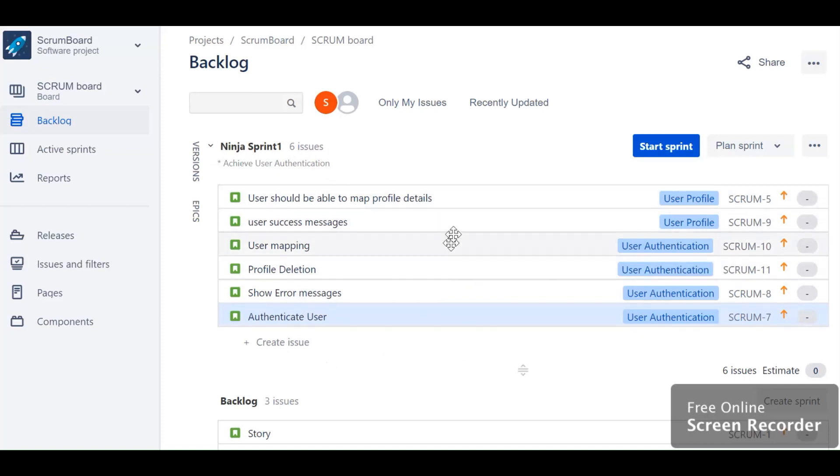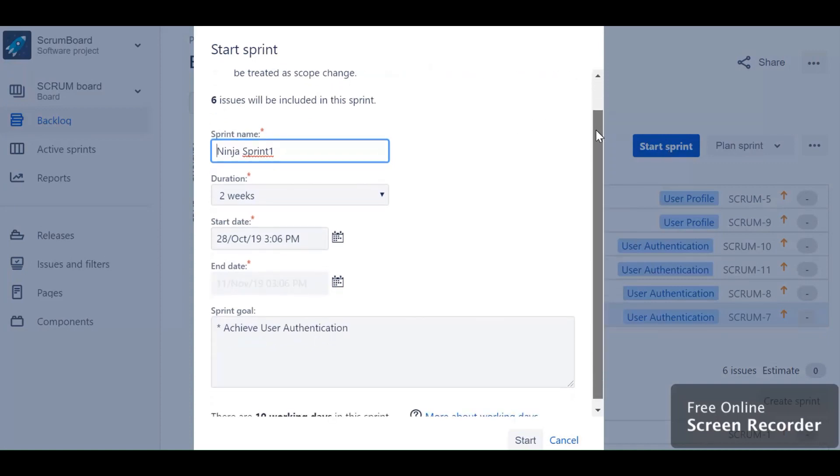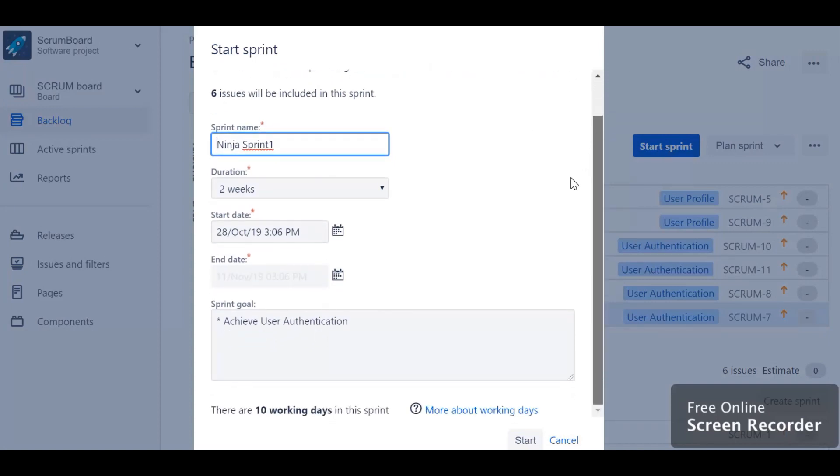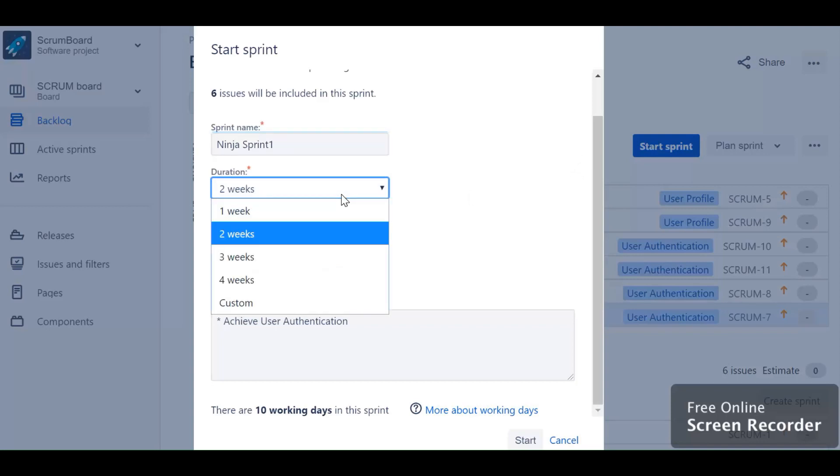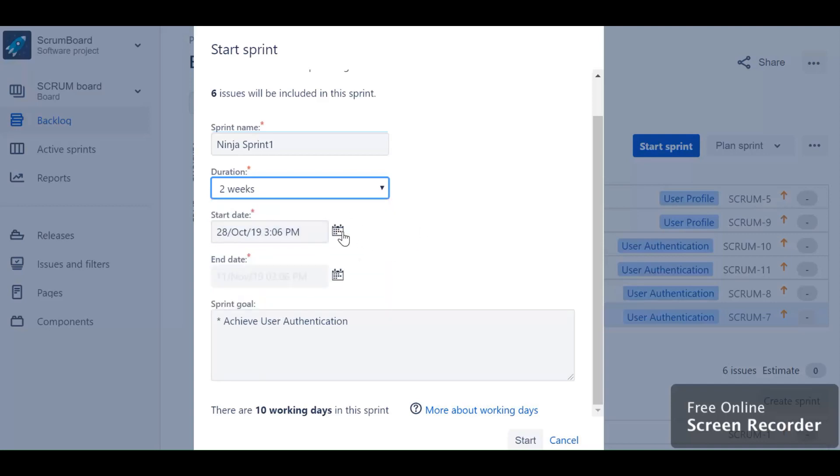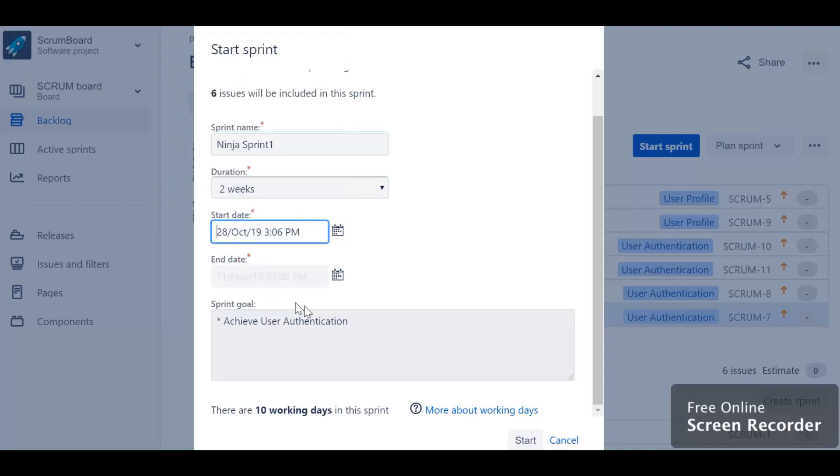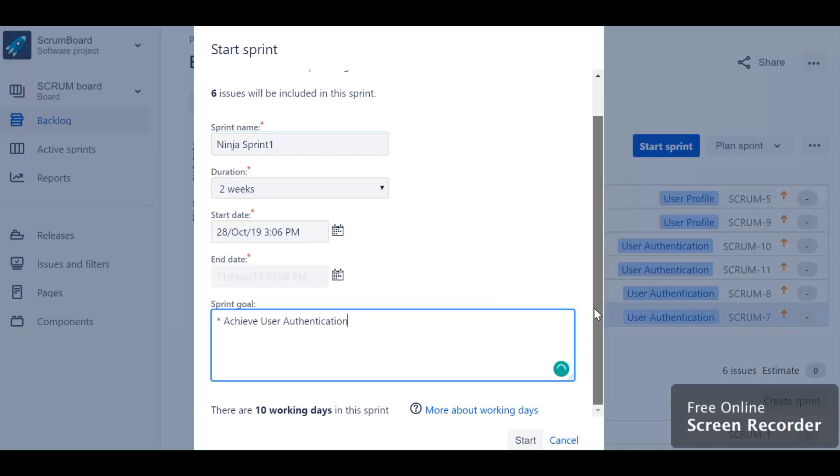Let's click on the start button. By clicking on the start button, it gives you some configuration options. You can select the duration of the sprint - one week, two weeks, or you can even customize the duration. I have selected two weeks of sprint. You can select the date and the time of starting of the sprint. Based upon the start date, JIRA has calculated your end date. You can add the sprint goals over here again.